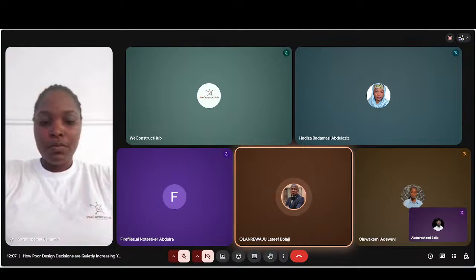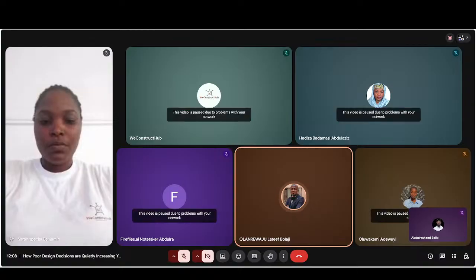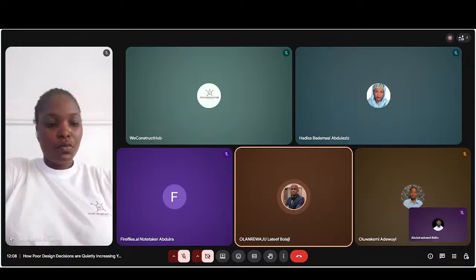So basically, what I'm saying is late design changes trigger rush orders and restocking fees. The third one would be incomplete scoping and ignoring market prices. You are bidding for a project this year, say May 2026, and you went back to your archives and used the last year's price.